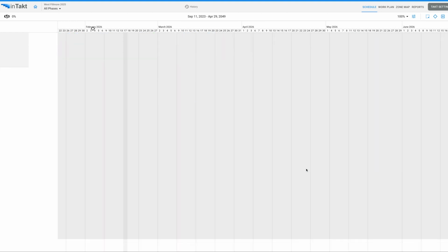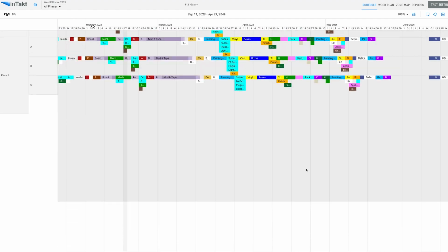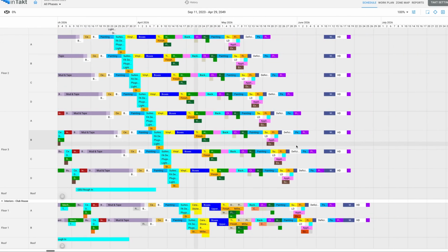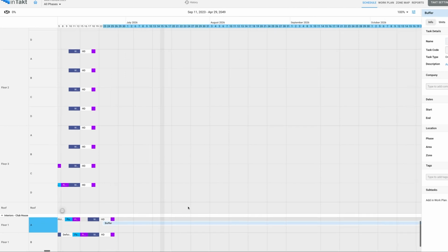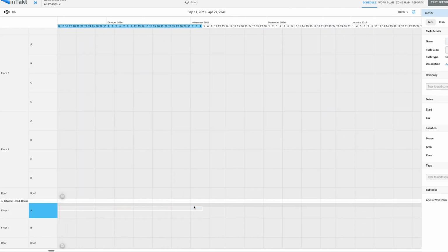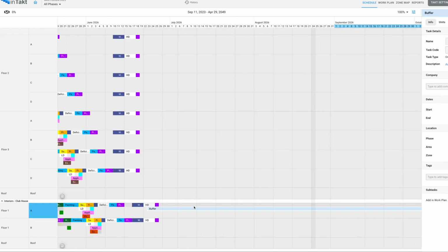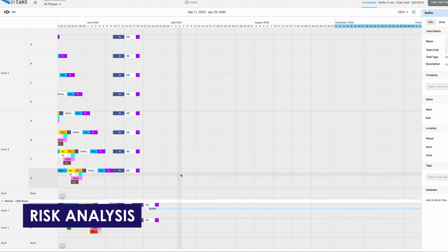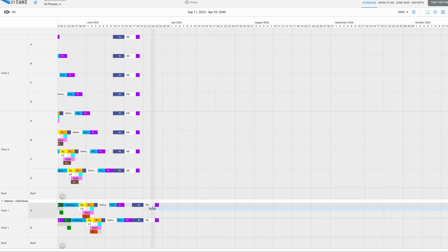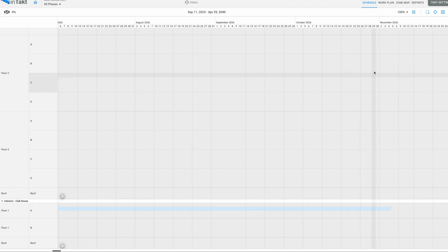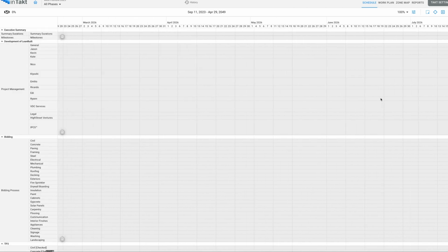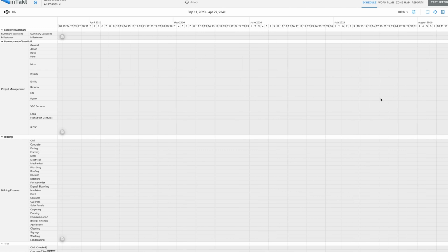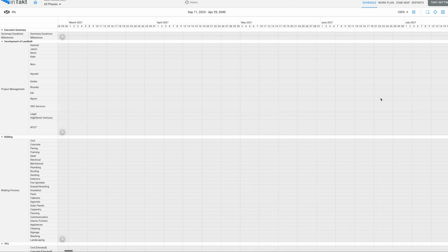So one of the first things that I want to take you to is I want to go down to the bottom of the production plan actually. Sorry, it took a little bit to render there, but you'll see this is the end, and then we have a bit of a buffer. Now this looks like a big buffer, but you will need some time in that buffer according to your risk analysis. So when you create your macro level tact plan, you need to make sure that you understand the end in relation to your substantial completion date, and make sure that all of that is 100% vetted and ready to go. And so that should be up here in a milestone on the top.